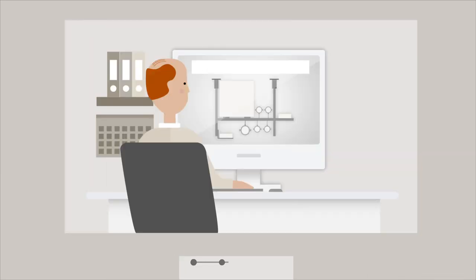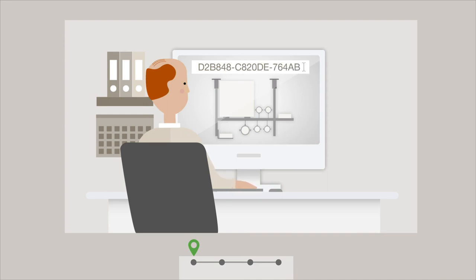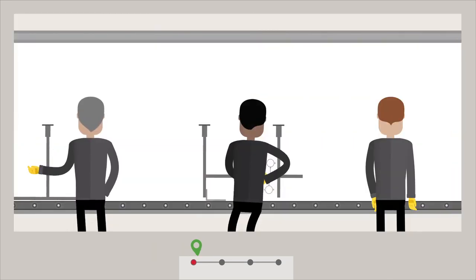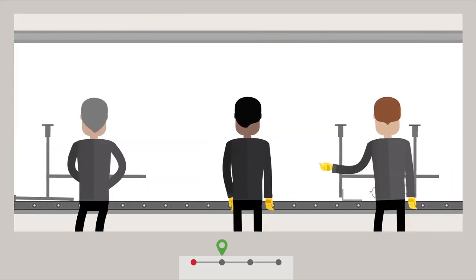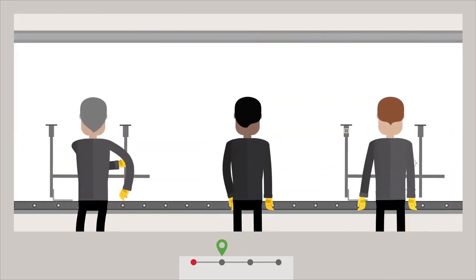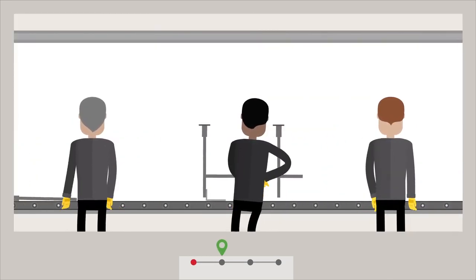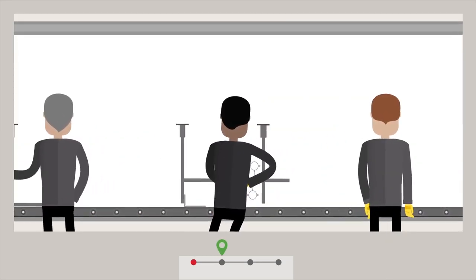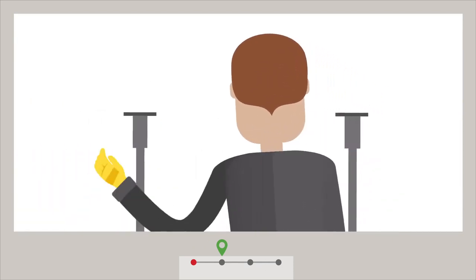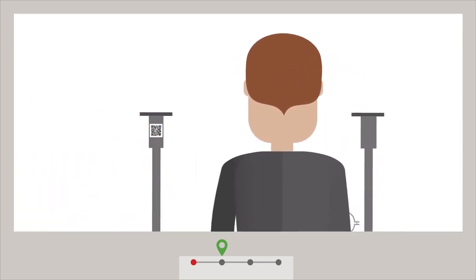Early collaboration in the design phase enables the connection between the digital model and the real-life construction through creation of unique IDs. After pre-assembly, the integrated supply chain keeps transparency on the progress being delivered on-site.